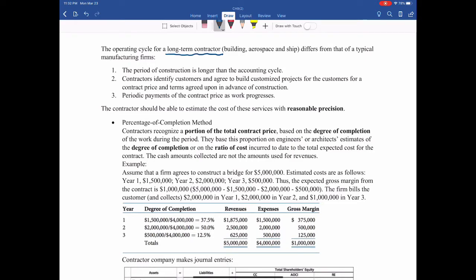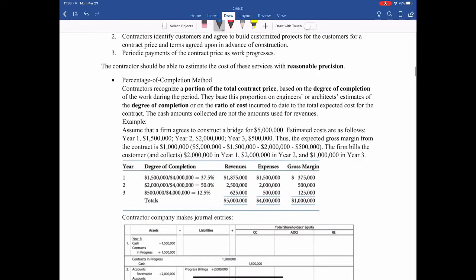So how to recognize the revenue for these long-term contractors? There are several methods. One is the percentage of completion method. In this method, we use the costs to determine the revenue recognition. The idea is that revenue and costs are mostly matched. For the long-term contract, the expense can be estimated beforehand.